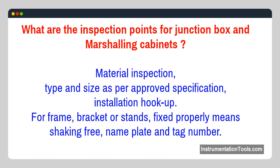What are the inspection points for junction boxes and marshalling cabinets? Material inspection — type and size as per approved specification — installation hookup. For frame, bracket, or stands: fixed properly (shaking-free), name plate, and tag number.